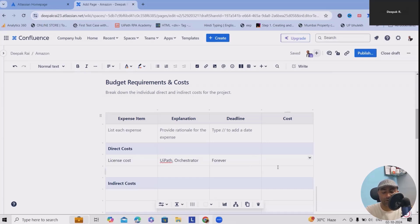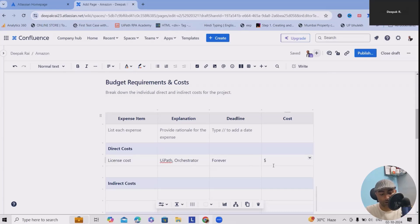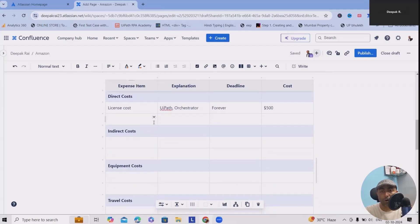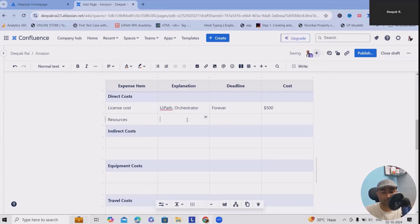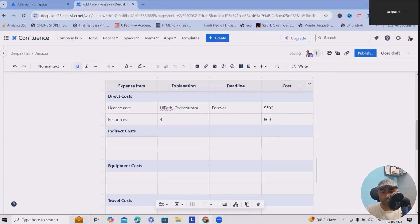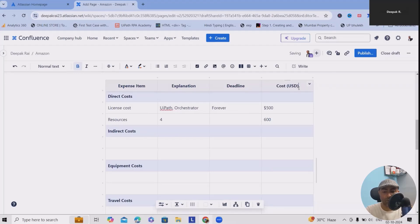Deadline - what is the deadline of these costs? Till what time will this cost be required? Till the time this automation will be there, we need UiPath, so we'll use forever. For cost, let's consider I want to add the cost as $500. Apart from this, we also need resources working. Let's consider we have four resources. The cost of all four resources is added as 600. All the costs are in USD.